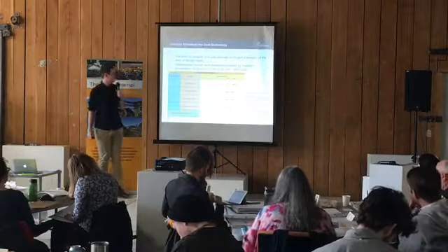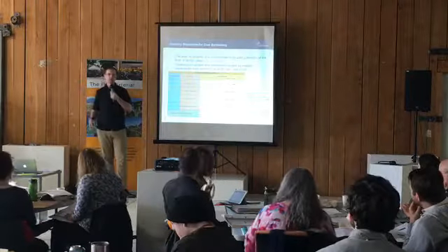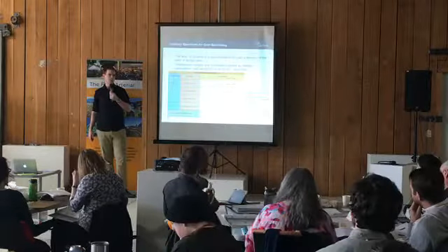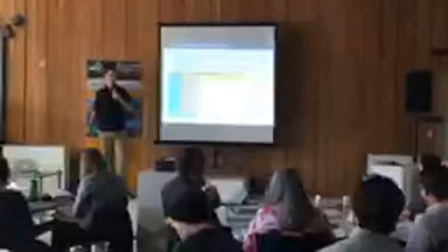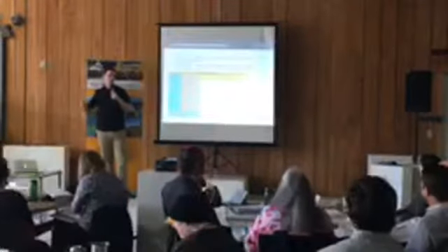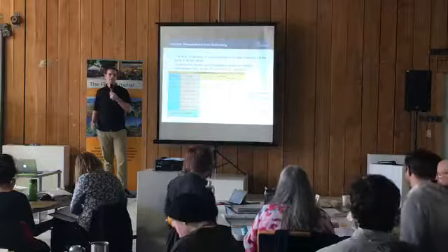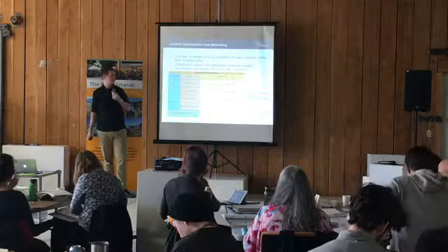So right now we are at the Class D level, just because we have some fairly high-level designs, and we know there's a lot of uncertainties and unknowns in each of these estimates, and as a result of that, the potential for variation in the cost estimate is greater. As the design is refined and becomes more detailed over time, then the level of confidence and certainty in the estimates increase, and that variation can be reduced.